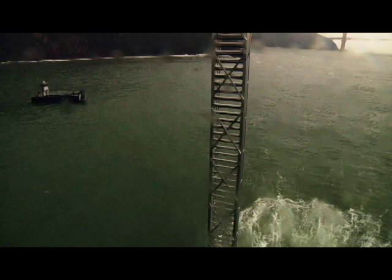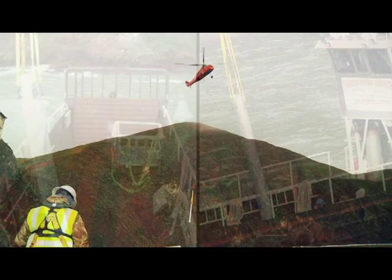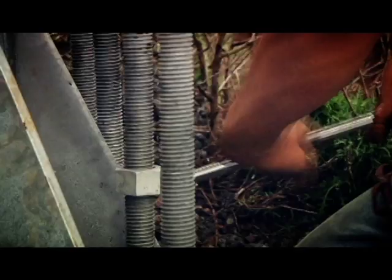The Aton pedestal in the original contract was to be bolted to the rock, but we learned once we got up to the top that the whole ridge that Point Diablo sits on is actually like a decomposed shale, so there was really nothing to bolt to. We had to dig a footing. It was 6 feet deep and 4 foot squared.